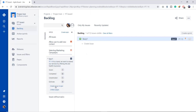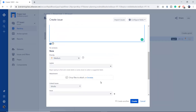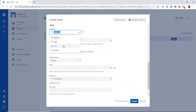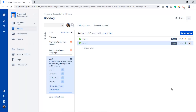Now I'm going to create a second issue using the second way. I'll click 'Create Issue in Epic' and create the second story. When I set the priority and come to the epic link, Epic One is already there. I'll click Create and you can see right now I have two stories under Epic One.